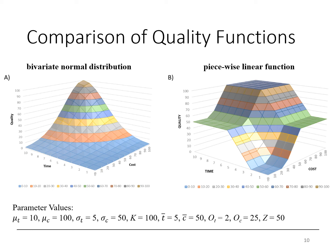On the right, we have our proposed piecewise function. We can see that after spending a certain amount of time and money on an activity, we reach a plateau at which additional time and money spent yields no further improvements in quality. This is related to the insight that at some point, spending extra time and money on an activity might not be the best use of that time and money, and it could be better spent somewhere else.